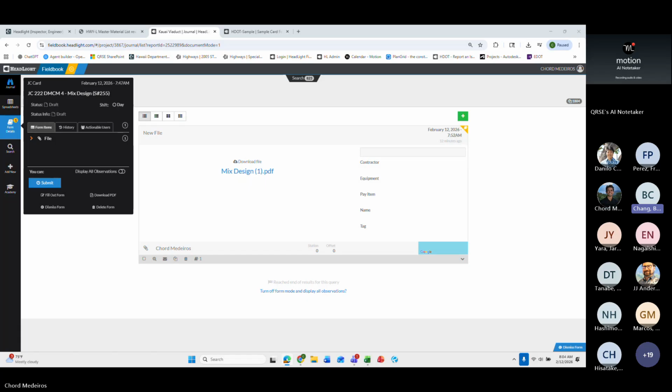Got you. Okay. Yes, that sounds very good. We experienced some of the sample cards returned for correction, and the submitter actually created a brand new sample card. If this is a brand new JC card, we highly recommend referring back to the original return for correction. But if we can use the same JC number, that would be better. Correct, yes, and that is the best practice. That is a procedure that should be followed. Obviously there may be mistakes along the way, but BC, that is the correct and intended workflow.